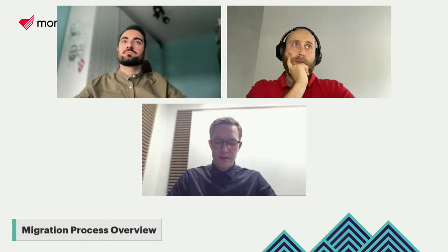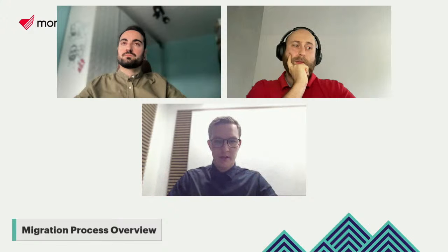And this is the interesting question from our side. Because we had enough time, we decided to just keep developing what we already had, and then Vue 3 was sidelined. And then every time we updated something in our system, we had to update it in Vue 3 too. So that's the backside of the coin. But it's the decision we went with because it suited us best, and because we had enough time. We are not blocked in any sense of this Vue 3 migration.